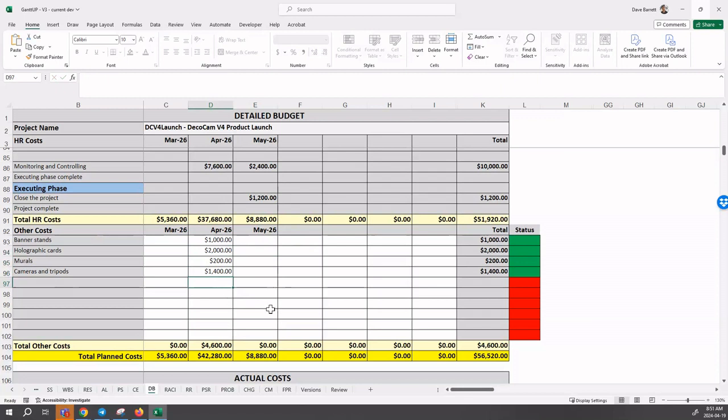I don't randomly put it in a month. I go to the project schedule and determine when it is planned to occur. Very important, because then you can see the total of the other costs.